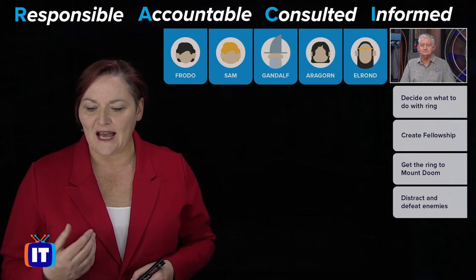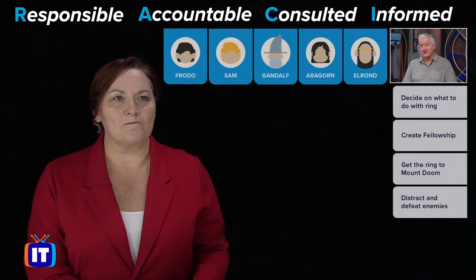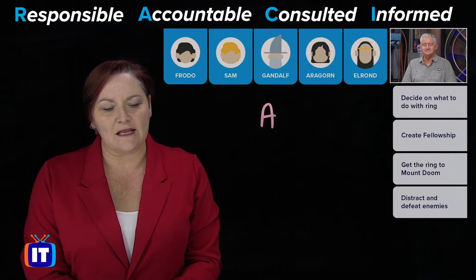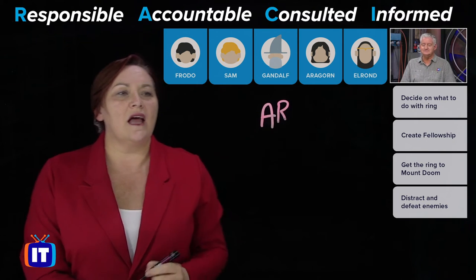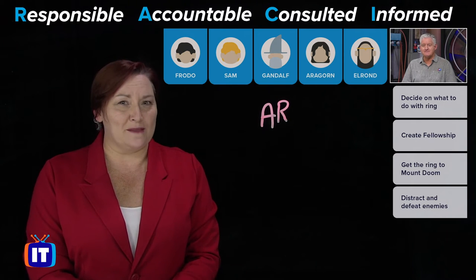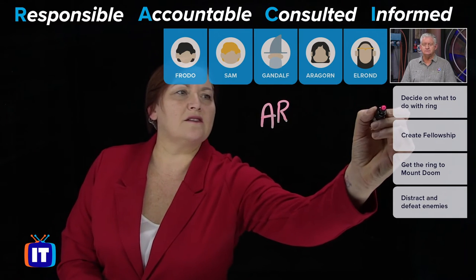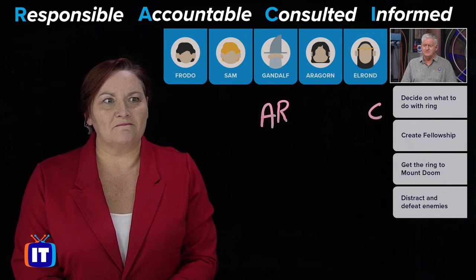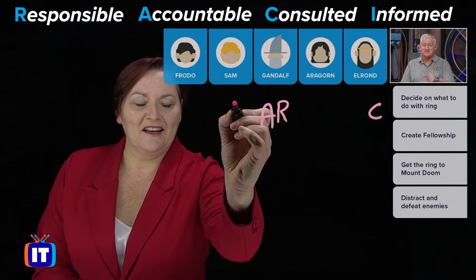Somebody has to decide what to do with the ring. Who ensures that a decision is made? Gandalf the Grey. And who is actually responsible — who makes the decision? That's also Gandalf the Grey. No one else makes it. Is anybody's opinion sought? That would be Elrond — we're asking for Elrond's opinion. Do we tell anybody else? Yes, we're going to tell Sam, because Sam is going to help Frodo.